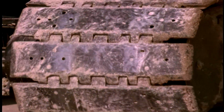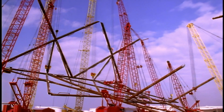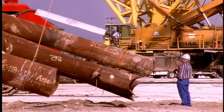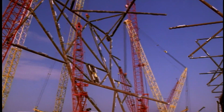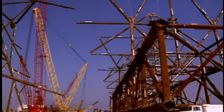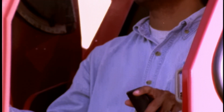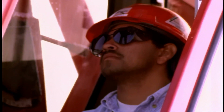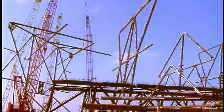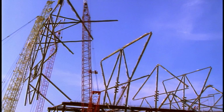At a minimum, the Spirit jacket had to support simultaneous drilling and production facilities exerting a force of approximately 8,500 tons and hurricane force topsides loads of 7,500 tons. Installation characteristics had to accommodate both site conditions and the capabilities of marine construction barges available in the Gulf of Mexico. Shell evaluated a total of 6 options, including tripods, lifted and launched jackets, before choosing a highly battered, launched configuration weighing 9,500 tons.